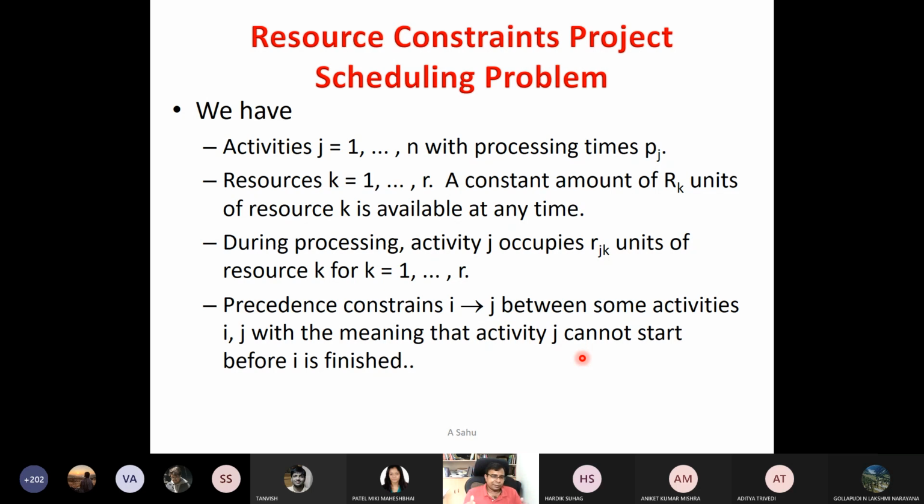It needs to be a directed acyclic graph, then only we can define them. Why am I saying DAG, not simple directed? If it is only directed and has a cycle, then you cannot define predecessor and successor relations. But if it is directed and acyclic, then we can define predecessor and successor relations for a node, how many predecessors and how many successors.